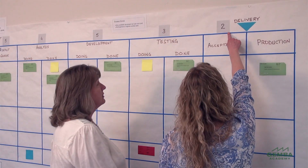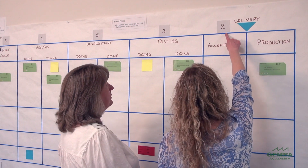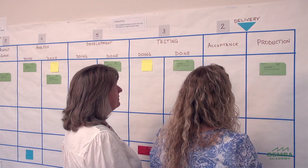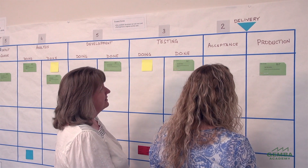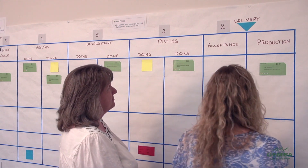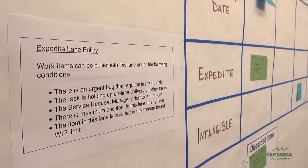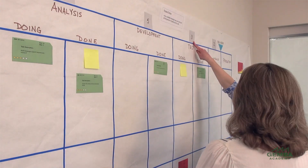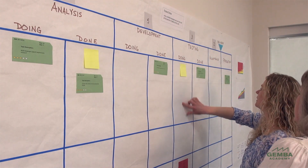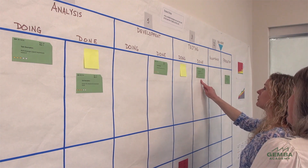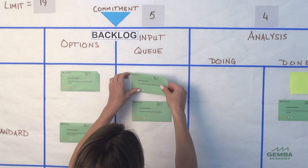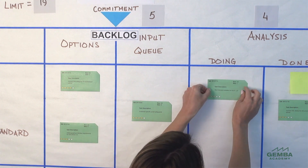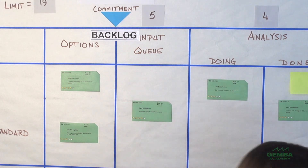The right side of a Kanban board represents the work committed, in progress, or finished. Teams use the right side to manage workflow in the present. The Kanban board visualizes the status of all work items in progress, as well as their priority. Kanban boards are designed to give team members the information they need to execute the plan. As capacity becomes available, they pull the next most important task from ready to doing and begin working on it.